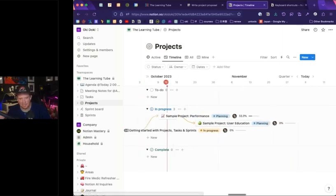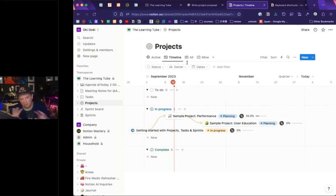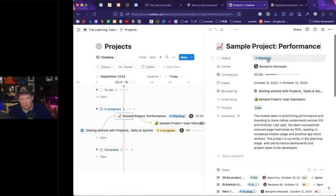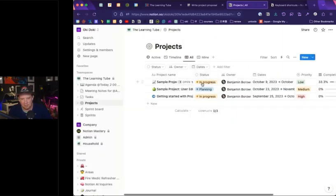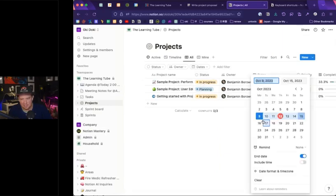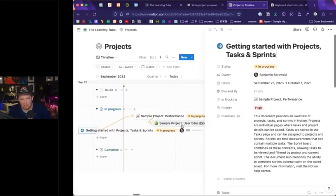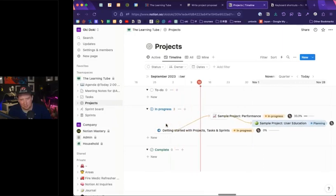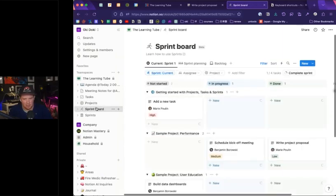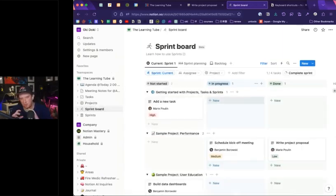You can see Notion has built a project planner with dependencies, shown on a timeline with an orange arrow pointing from the dependent task to the next step in the process. This allows you to lay out your work-back schedule on a timeline. All these views are the same database source — if I open a project and set it to in progress, it updates in the all-tasks view as well. If I change the dates, the project moves to that place in the timeline, and you can drag it directly on the timeline too.